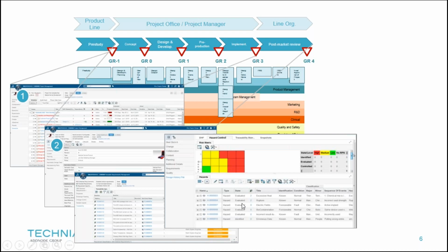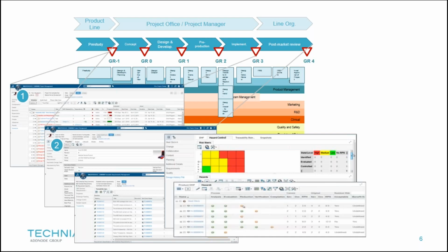So we're tracking these hazards. We take them over from the product definition, from the parts and bill of materials, and we take them forward through the use of a project. And when doing so, of course, we can track, for example, as with the hazards here, we can track those over time towards the different design controls, design inputs and design outputs, to see: do we control the residual risk, as in this case? Do we control the compliance status as the project is progressing?